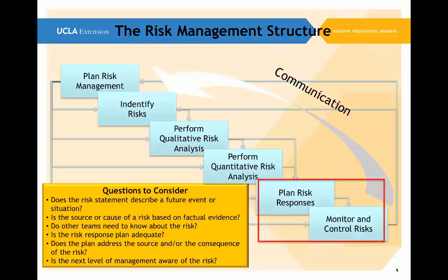And once we have planned our risk responses and we've set that in motion, whether it's a mitigation action or avoidance action, and we'll talk more about those later in another week, once we have all those established, then we set up a process of monitoring and controlling the risks. And what that means primarily is that we set up a process where we are going to periodically, on a reasonable basis, every couple of weeks, every month,